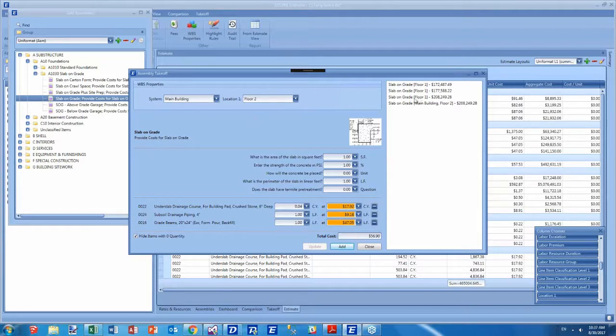So I can change this. I can go in and give values for system here, and they will show up here. And if I make changes to what I consider important to track for location or for whatever buckets I want to break my estimate down in, by changing the sticky WBS properties, it will update accordingly here, so that you aren't stuck with whatever information's here. If all of a sudden something else becomes important, or I realize I totally messed up and forgot to set certain properties as sticky earlier, I can come back in, set it as sticky now, and then boom, these will automatically update. So you're not having to go back in and redo any work to make sense for you at a later date, it'll automatically have that information.